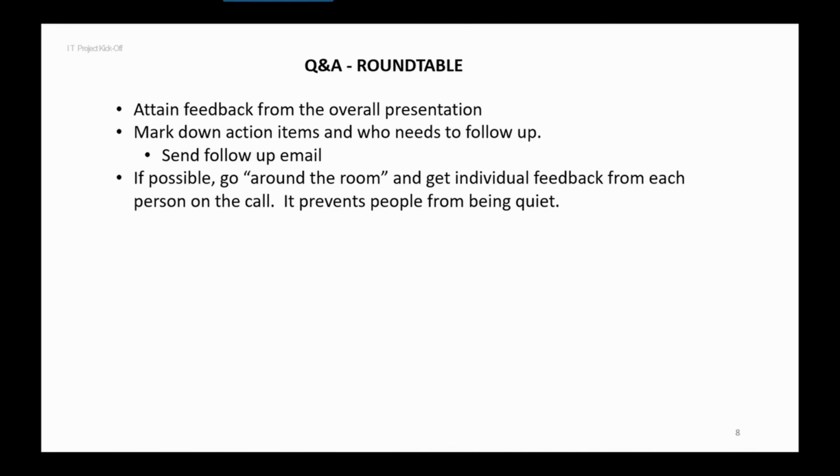You want to send out a follow-up email with meeting notes or a summary of what was discussed in the kickoff deck session. So in that way, there's no confusion. And if you have some people on the call who are pretty quiet, you can actually go around the room and get individual feedback. This encourages everyone to give feedback or raise concerns, and you avoid the situation where certain people are not speaking up. And that's basically it for this roundtable slide.